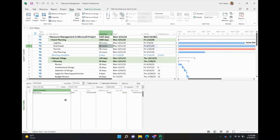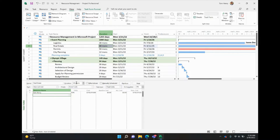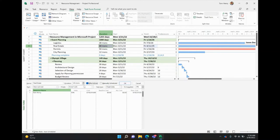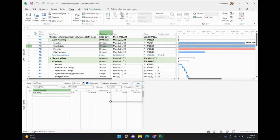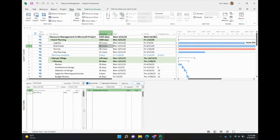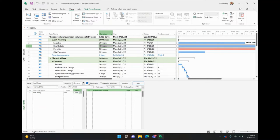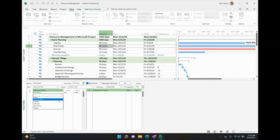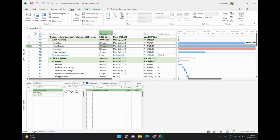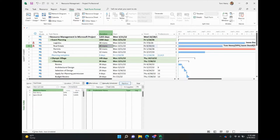And I look at that now, we've gone from 20 to 40 months, but the work will get done. And that's a reasonable amount of time. Now, if you wanted to assign a second resource to help with that, maybe Jason can help to bring that time in. We want to get the duration back. What I'm going to do is click Effort Driven. That locks the work for this task. In fact, let's switch this table out to the resources and predecessors. So you right click in here. This is actually the default. I can see how many work hours are on this task. 3200. Effort Driven is checked. That won't change. When you check the Effort Driven, when you assign a second resource, the work remains consistent. Come in here and add Jason, who also works the 50%. When I press OK, boom, the work split. We're now back on track.